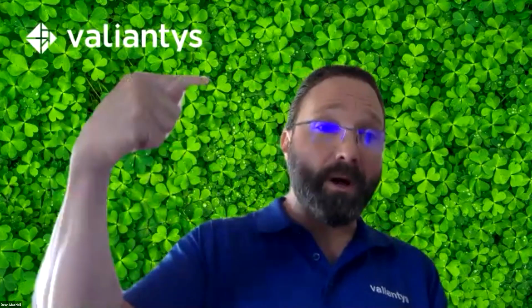But you could override that. Like if you know, hey, actually, we have a lot of guys on vacation this quarter, so we're going to reduce it. Or maybe now we've supplemented the team, so we're going to increase it. So even though it does these auto calculations to give you a starting point, you've got the knowledge, whether you're at the team level as a Scrum Master or as an RTE at the program level. You could override that and say, I'm going to base it on what I know, because we've made some moves to handle this situation differently than would have been projected based on past performance. And Roma, let me know if you have anything else to add there that might help.